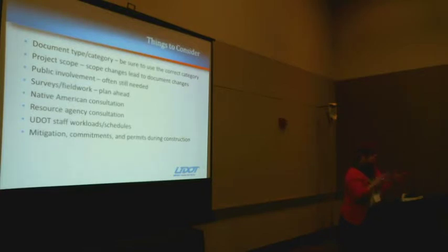You can always do a little bit extra in your CE to avoid having to redo the document later and to capture potential changes. For example, this happens a lot with a road-to-mill overlay project. They decide later on to add in rumble strips or replace guardrail or do shouldering. So if you think that might happen on your project, just work with your project manager, or if you're a consultant preparing it, double check with the environmental manager.